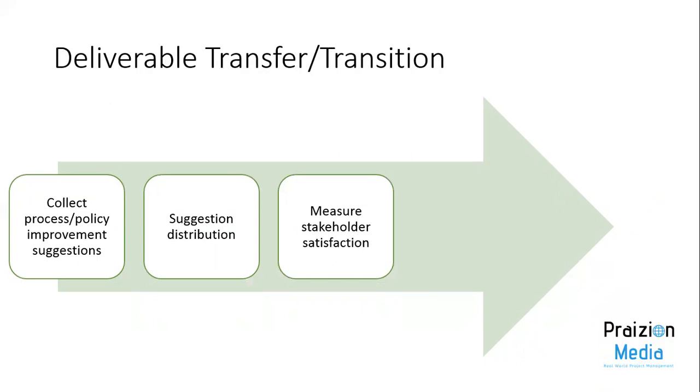Next, the project manager should measure stakeholder satisfaction. Is a stakeholder happy, pleased? If there is a net promoter score or some other qualitative measurement, that could be gleaned to understand the stakeholders' disposition to the project overall. It is not too late to make amends at this point because the project is not closed.